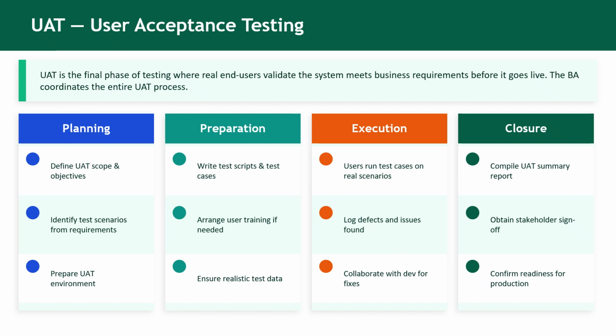Next stage is preparation. Here the BA prepares detailed test cases and test scripts that users will follow during testing. If required, the BA also arranges training sessions for users so that they understand how to use the system. Additionally, realistic test data is prepared to simulate real-world scenarios.